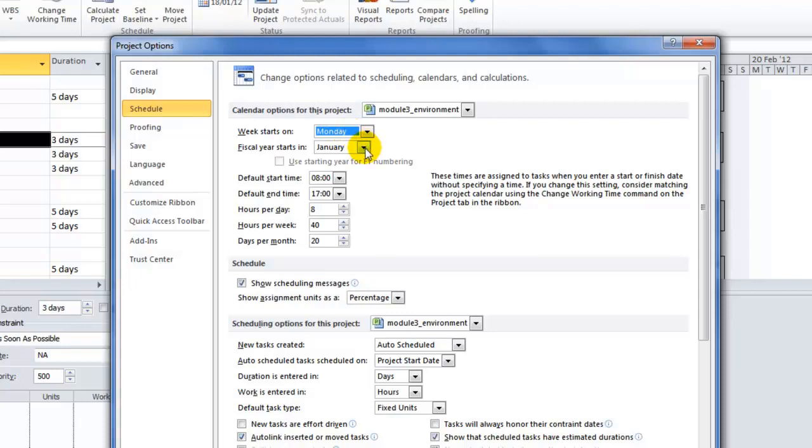For those of you who have a fiscal year, particularly where projects are traversing the fiscal year boundary, it might be useful to actually change the fiscal year start. Having January is in perfect harmony with the annual calendar, of course. If, for example, April is a key date, often in Europe, April is used as a fiscal start, although it could be any other month, you'll be telling Microsoft Project when indeed you want costs for fiscal years to be calculated.